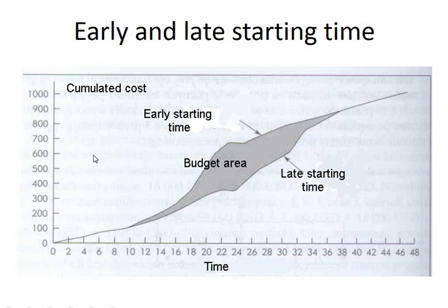So if you get your money from the investor early, then if you got it like here, then you wouldn't have to have a great budget on your own. On the other hand, if the investor is paying you after a while, after you have finished each part of the product, then this is the money you need to have at your disposal.